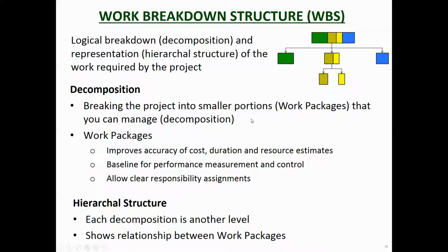By doing that, you're increasing the accuracy of the cost, duration, and resource estimates. If you can look at this in a lot of detail, it's much easier to estimate how much that's going to cost than this whole thing. Do the same for this, do the same for this, do the same for that. When you add them all up together, you're going to have something that's much more accurate than if you just looked at it as a whole.